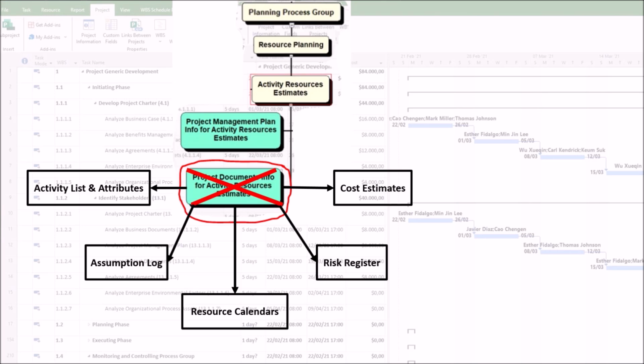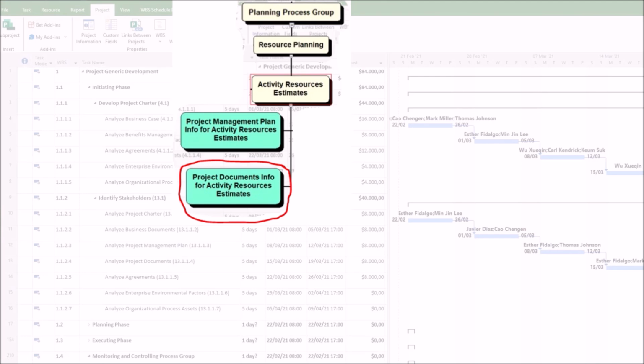In conclusion, a poor resource estimation has a domino effect across the entire project, as follows. First, unrealistic schedules due to estimated activity durations. If you don't know the right resources or their true availability, any duration estimate is a guess. This leads to missed deadlines and an unreliable project schedule.